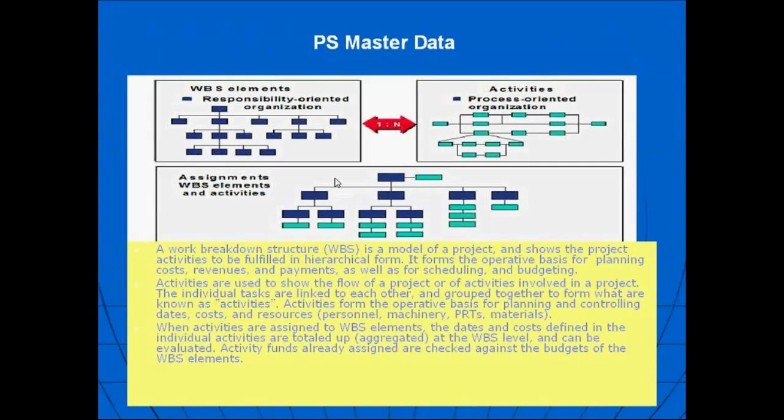So when activities are assigned to a WBS, date and cost get aggregated upward. The cost of these two activities goes up to the level above, and from these two WBS the cost goes up here, and all these four go up here. Combined, at the top level you come to know that to complete this project I require 40,000 rupees. If you are selling, then sales people will put in their margin, whatever is decided, and send a quotation to the client. This is the normal process.